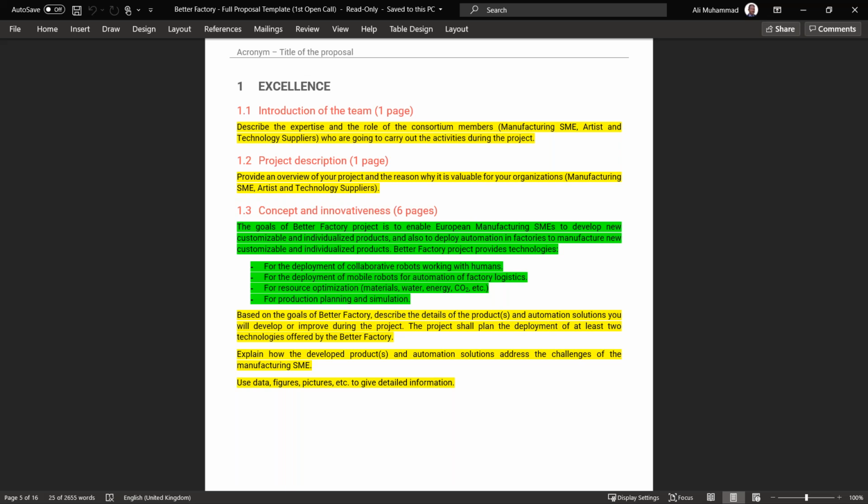And I also don't see, as a technology supplier, we work with various customers, and typically in the industry, there is something called a statement of work, where the core of the proposal is about which resources, like which engineers work for how long. So we try to capture maybe man hours or man months, and then that translates into cost. So you are nowhere asking for such things?